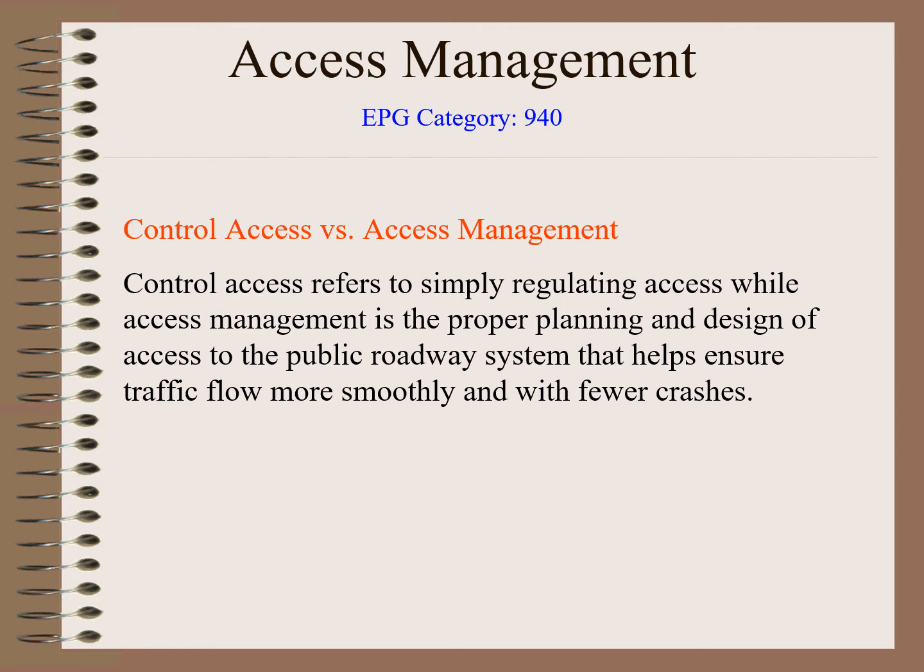So access management is the process that as a designer you need to take into account when talking to property owners. Discussing the access to property needs to happen early on in the process so that you can come to a consensus and negotiate with the property owner, or the project manager can have sufficient time to understand the needs of the property owner and negotiate a solution that provides the best, the safest approach for accessing the property.